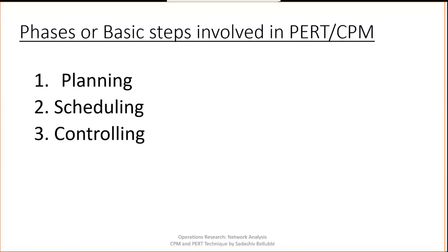And the second phase is the scheduling. This scheduling consists of determining the sequential order of the activities and other information, like what is the starting time and what is the finishing time for each activity. And next one is the critical path, on which activities require special attention.